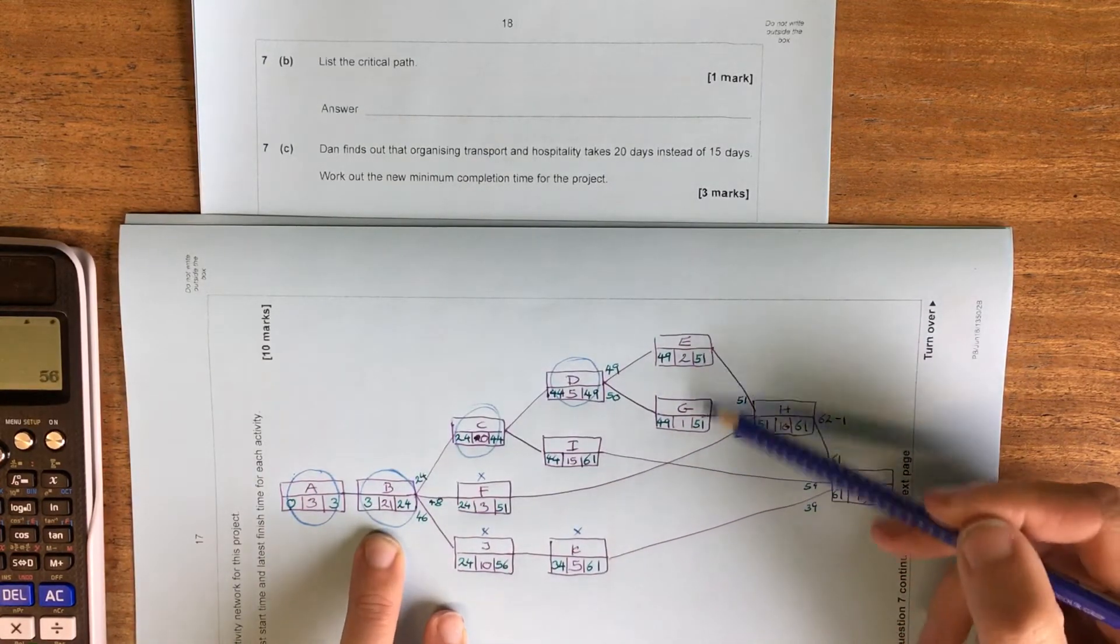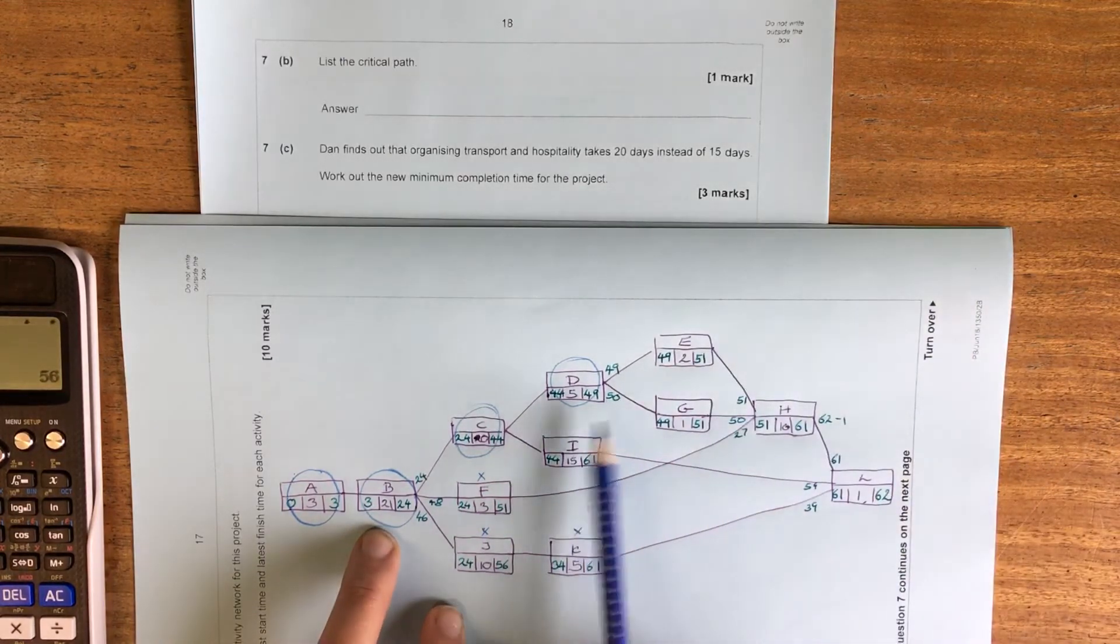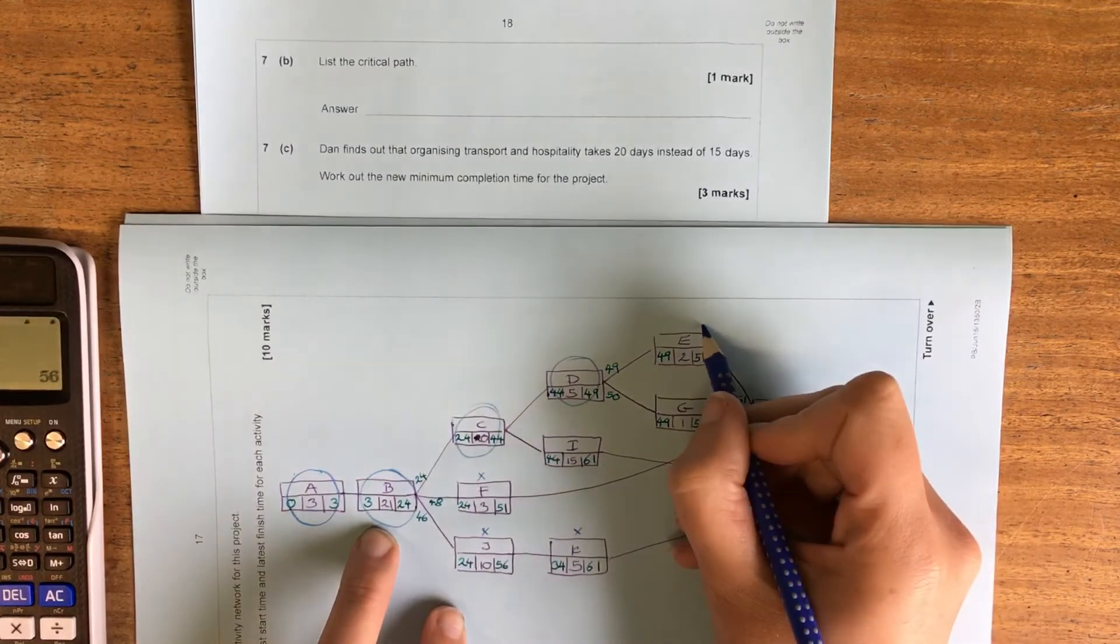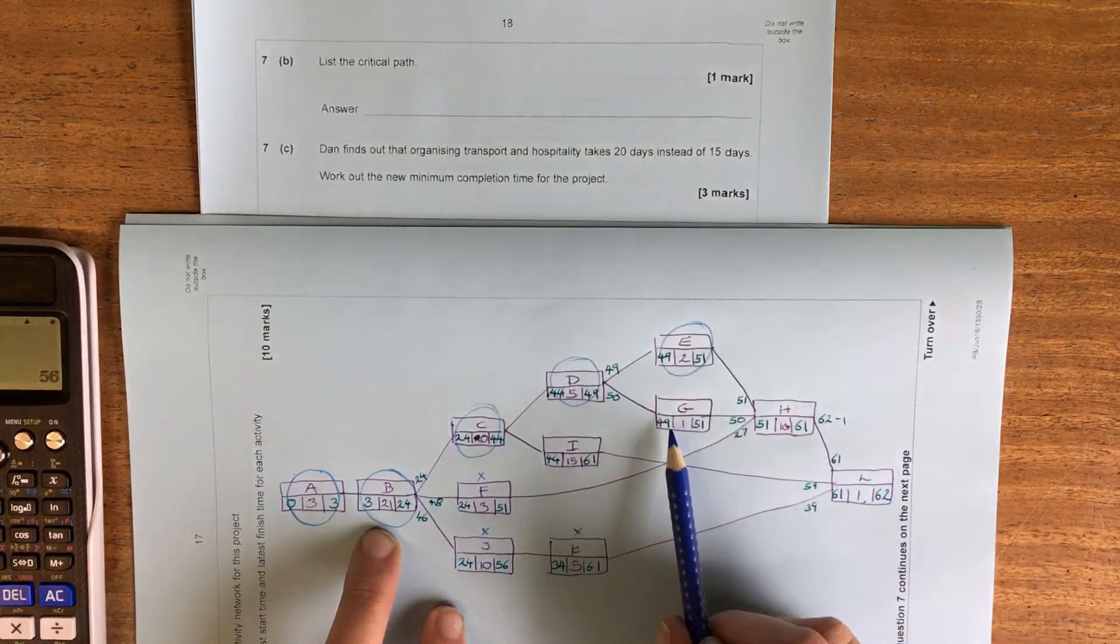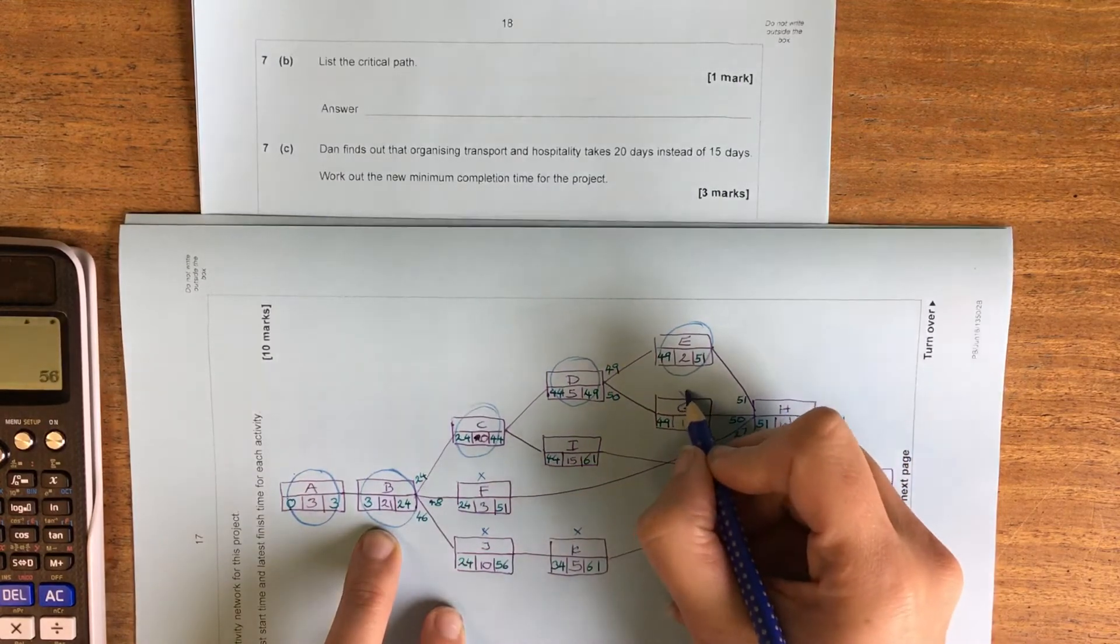That means one of these two or possibly both are also going to be critical. So 49 and 2 is 51. So 49 and 1 isn't 51. That one's not critical.